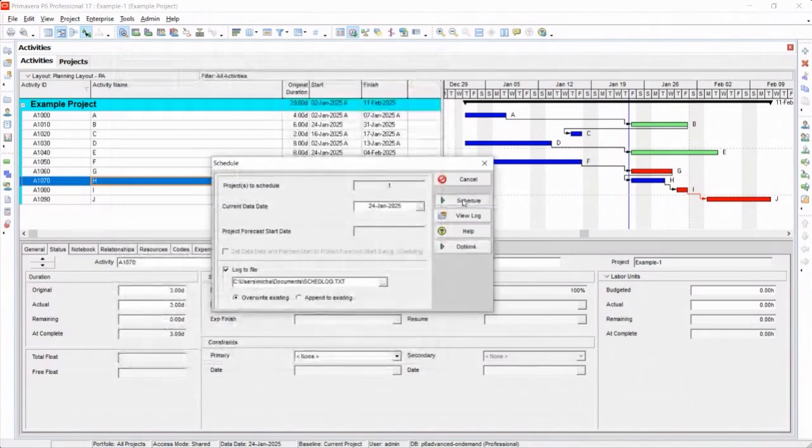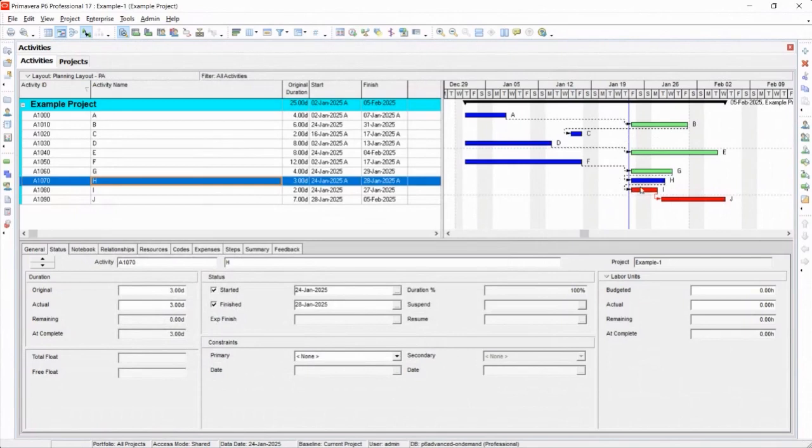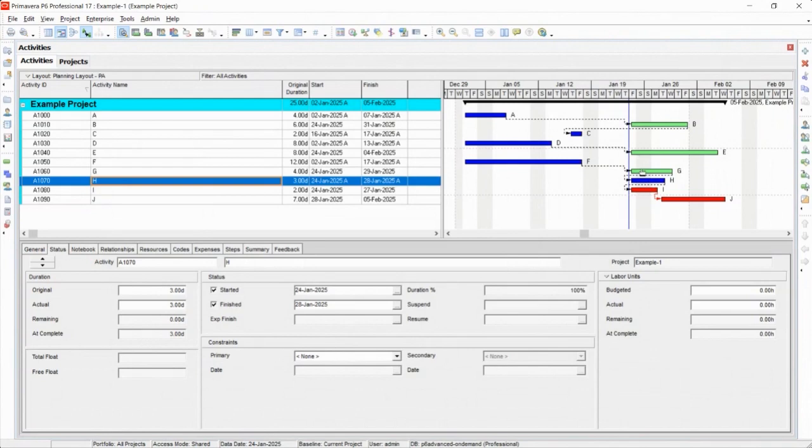Progress Override, what does it do? So if I reschedule this project with Progress Override, notice in the top case, nothing's shifted except that these are no longer driving links. They're now non-driving. But down here, I no longer have to do - I can do I and G at the same time. Because basically it said, well, you're not following the logic anyways, so we'll keep alive any logic from the data date forward, and we'll ignore anything before that.